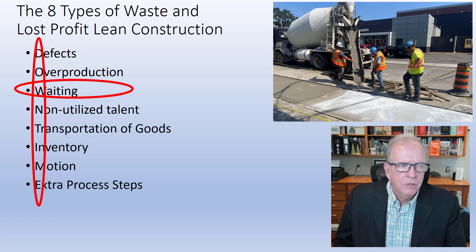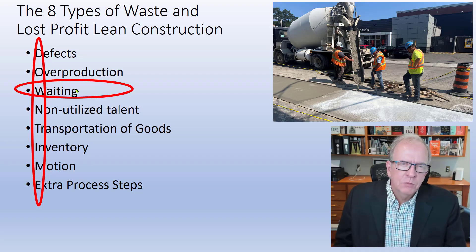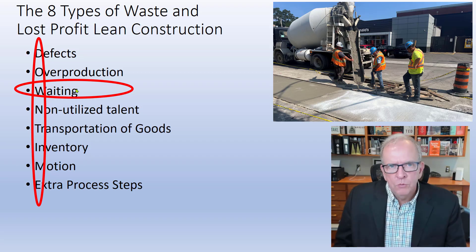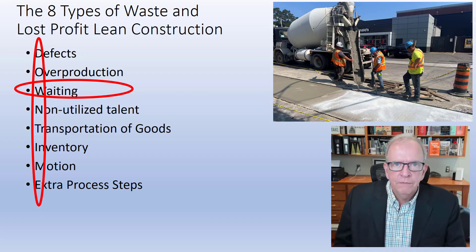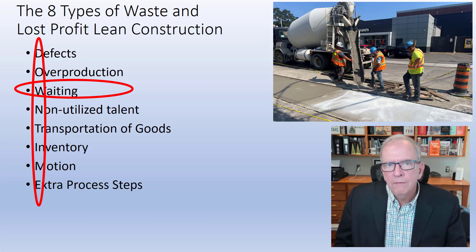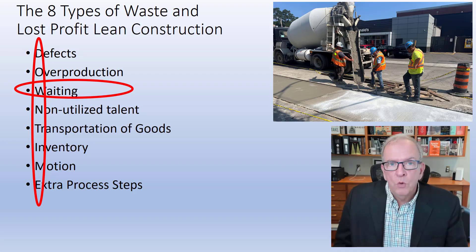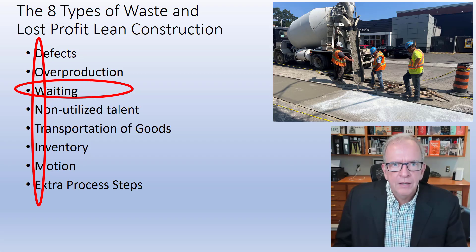Today we're talking about waiting, which we explore from two viewpoints: work waiting for workers and workers waiting for work. In this photo you can see concrete trucks and workers together — that's good. When workers wait a long time for the concrete to arrive, that's workers waiting for work. When the concrete truck arrives and we don't have enough workers, or material is delivered long before we need it, that's also a problem.